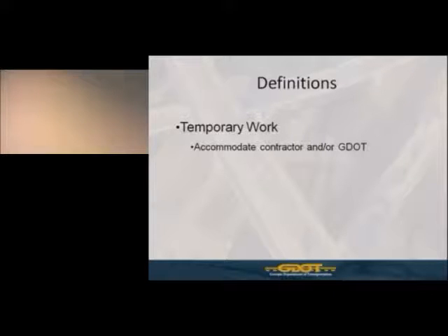We may see an example of this in, say, a bridge widening in a rural location, 2-lane road, with say an overhead power line right adjacent to the bridge, and there's not enough room to move equipment in to perform that work. So the department may request that you do a temporary box out, move your pole line away from the bridge line, in order to allow for construction activities to occur around the bridge. And then if the right-of-way is not sufficient for you to remain in place away from the bridge, you would have to move your pole line back in. So those would be temporary poles you had to place out to box out around the bridge. That would be the type of work you would be accounting for here typically.